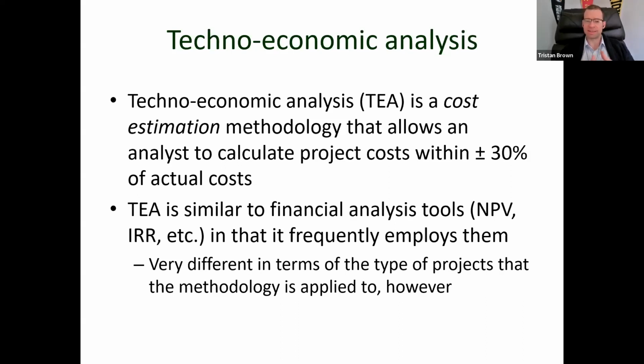And so they're very different in terms of the types of projects that the methodology is going to be applied to. So where a standard financial analysis is going to be utilizing market prices, things like that, with techno-economic analysis, we're going to be understanding pathways that have not yet been commercialized, that are not widespread, where you can't just open up an equipment catalog and say, okay, this is what this particular piece of equipment costs if I want to build this facility. It's more complex than that.